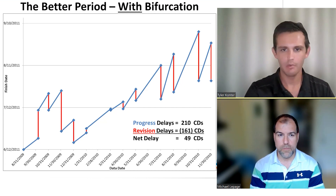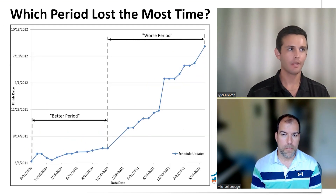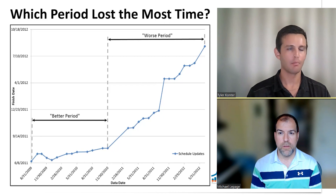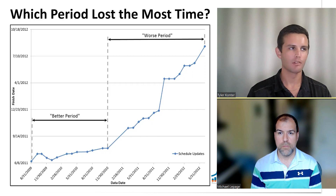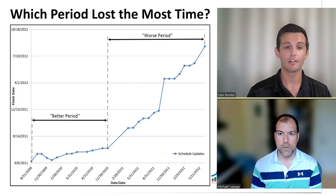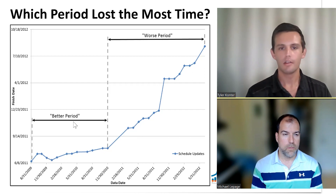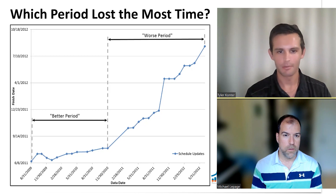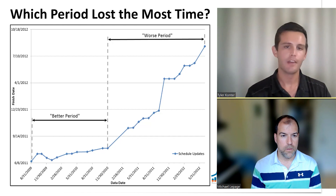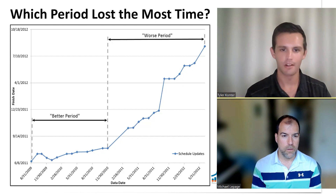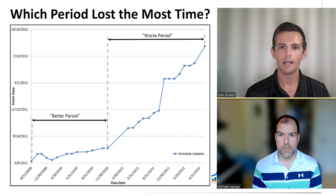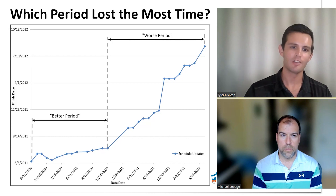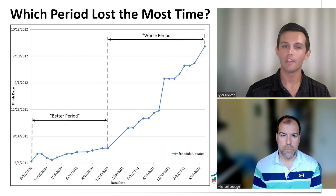That characterization of squeezing the project is something we see. It's borrowing from a later period, revising your plan, revising your forecast, which is ultimately going to make it more difficult in a lot of cases to complete that work later on. If we go back to our original graphic, we'll see in our better period we come to an end on November 30th, 2010, and we see a very drastic increase in the completion date of the project after that period. At a certain point you can no longer squeeze the project — maintaining the completion date for a long time until you can no longer maintain it is something I see very typically in what I do.